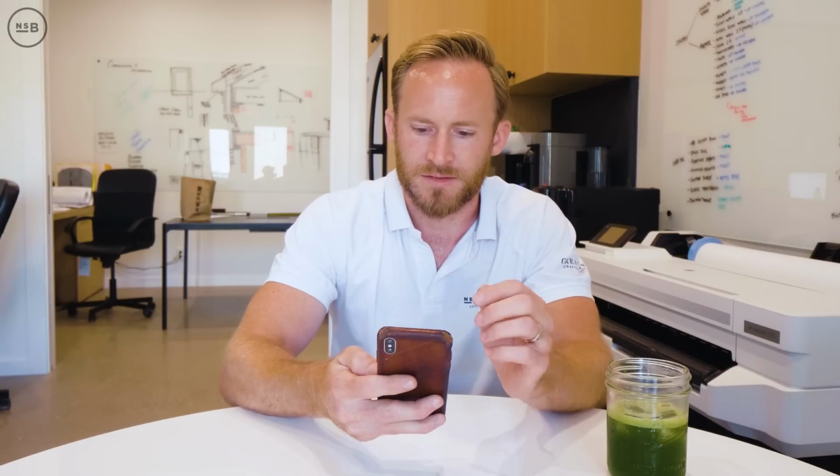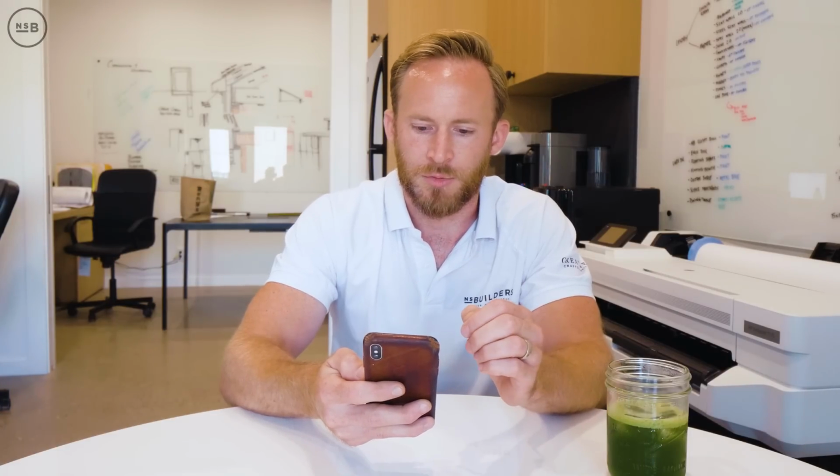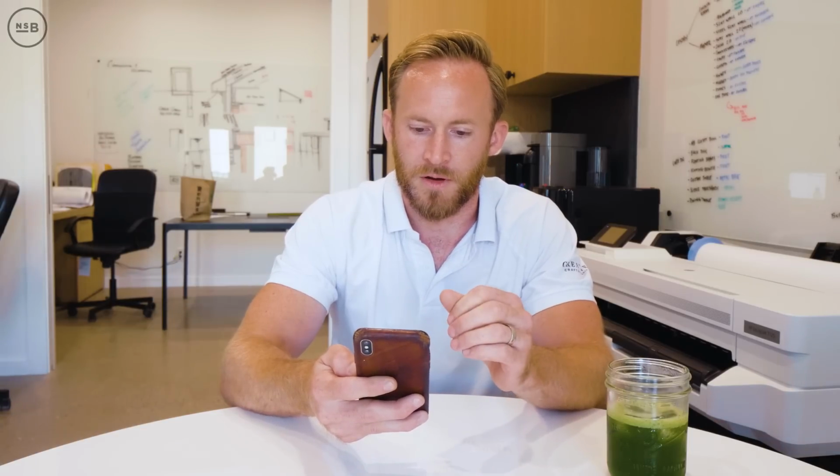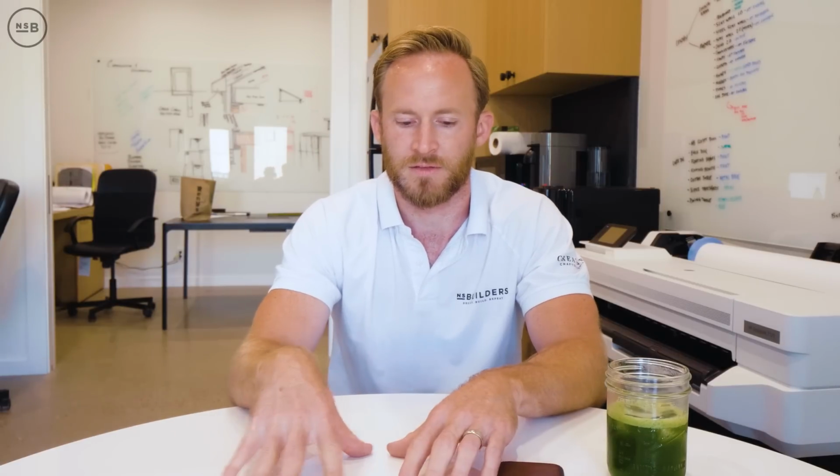Edward goes on to ask another question. How do you decide if a project is time and material, cost plus, or fixed price? And which of these systems do you prefer and is the most profitable for you? So really quick, time and material, cost plus, fixed cost. Time and material is, hey, I charge X amount per hour and my material cost is this much, and we bill at that. Cost plus is, here are all my costs. This is all the costs I have in labor, all the costs of material. I'm billing you that plus a fee. So that is cost plus. Different than time and material.